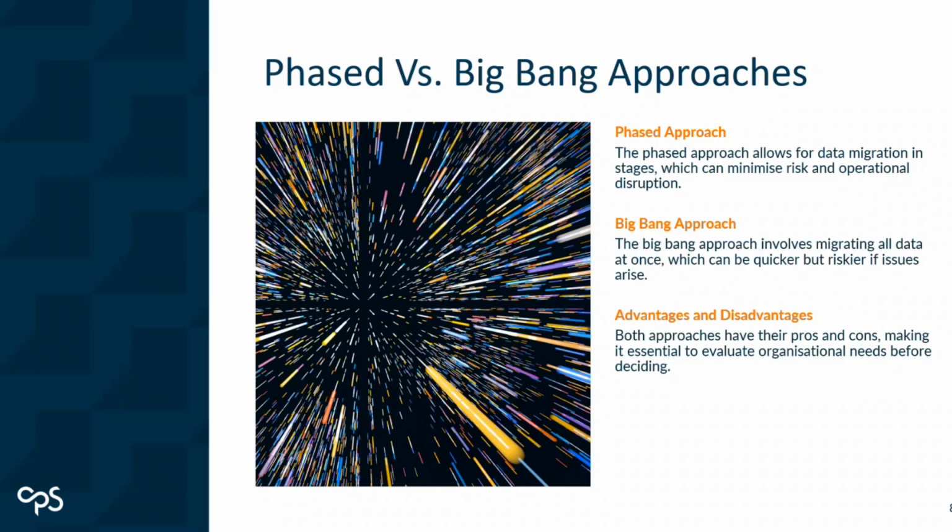If you have a problem at the weekend with your data migration, how does that play out into the business? So that is one of the biggest considerations. So if anybody ever looks to do a big bang approach, we generally would recommend you don't do it at weekend. It may seem advantageous to do it then because your users aren't in and working, but from a support perspective, sometimes it's a little bit more difficult to manage. And obviously then you've also got that limited flexibility.